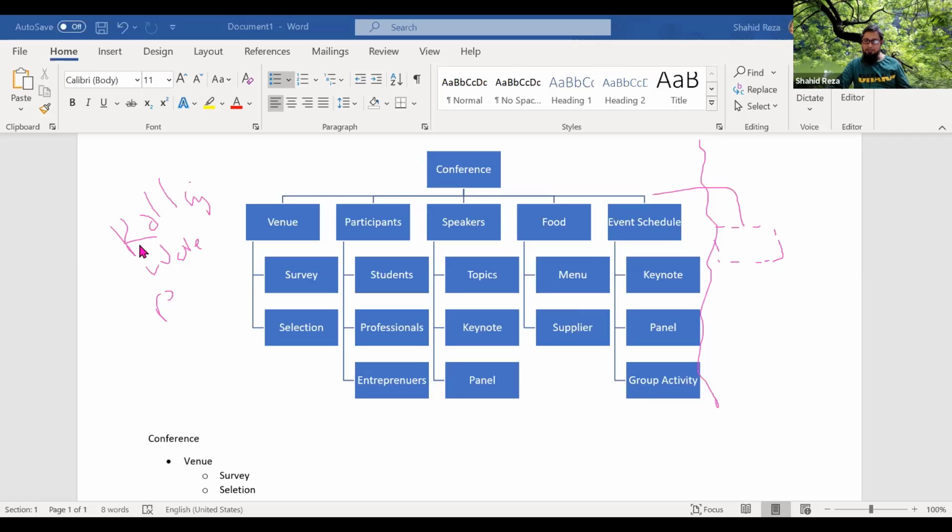Any question? Reza bhai, regarding rolling wave planning, basically, do you have any time limit? I mean, within 2 to 3 months, something like that? No, no. The idea behind rolling wave planning is that the near-term components you will detail down, and the things coming in the future, which you cannot go into detail on, will be detailed down when the information becomes available to you.